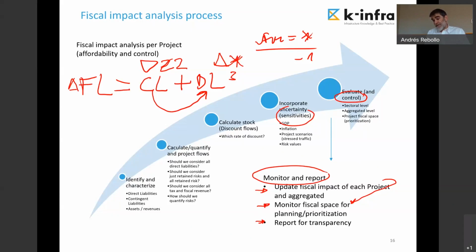In fact, if I discount to the WACC, the net present value of all the availability payments is the amount to be financed by the private party. So that value is the amount that the private party would ask me if I early terminate the project, because it represents the outstanding debt that they have to pay to the banks and the outstanding equity that they have to pay back to the investors.